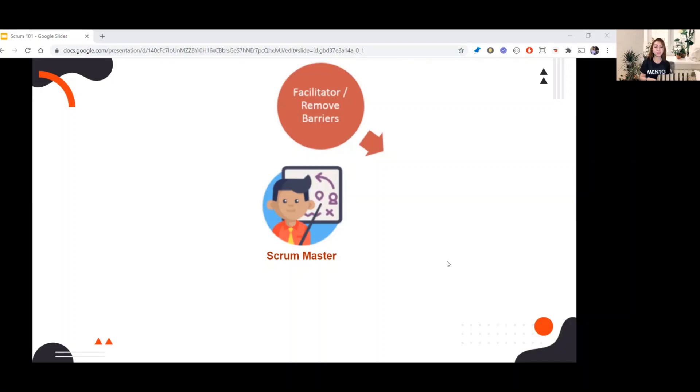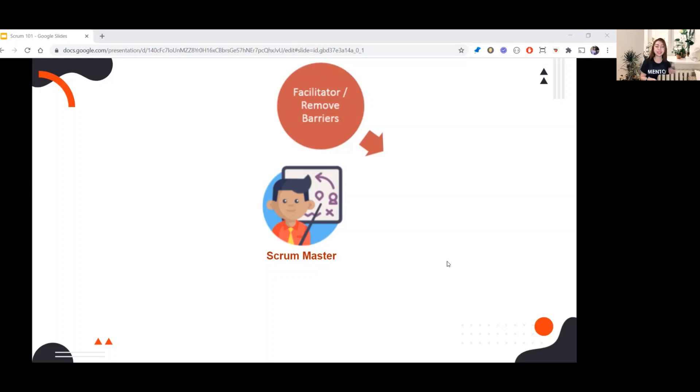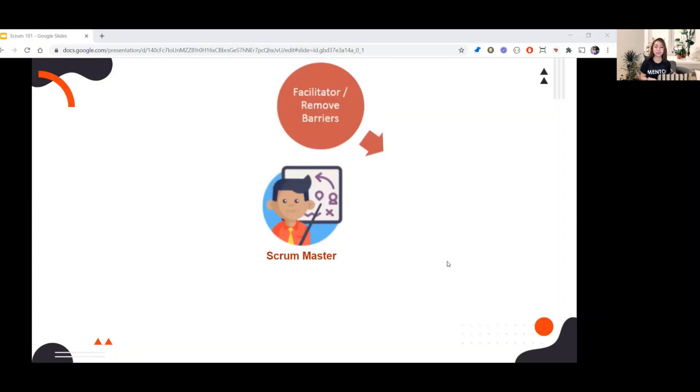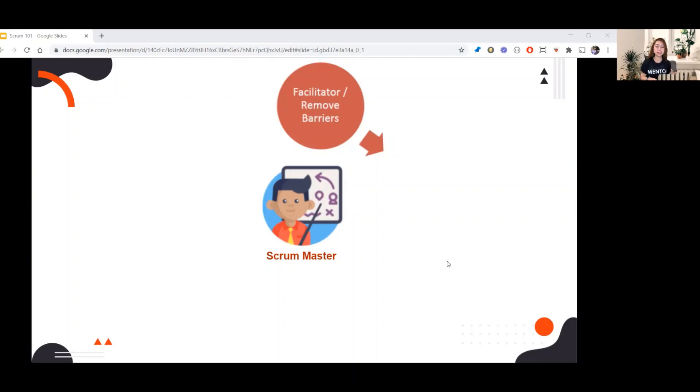Scrum Master removes barriers. For example, if someone in the team mentions their impediments during daily Scrum, Scrum Master should remove those impediments for the team to be able to continue their task to achieve the sprint goal. What is the meaning of impediments? In Scrum, impediment is a factor that blocks the development of the team. In short, blocker.